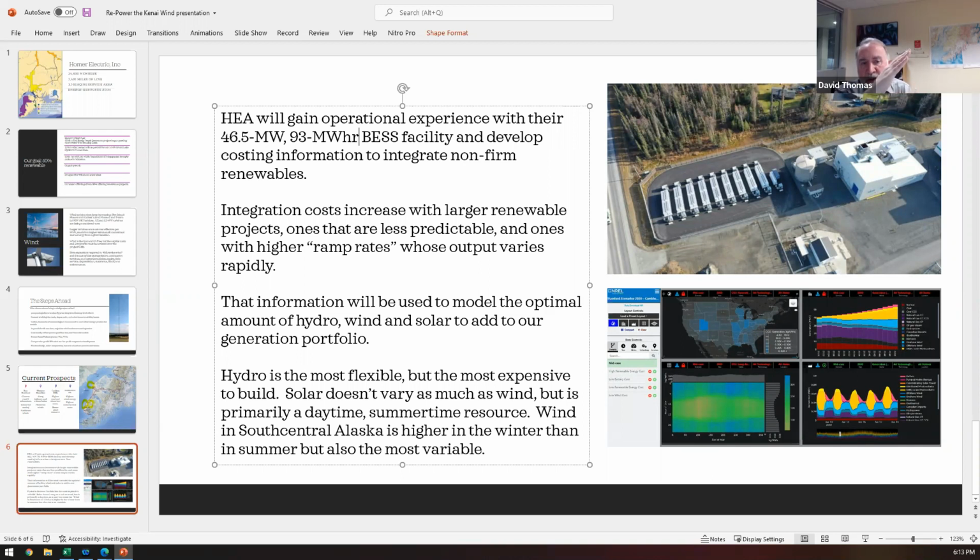It's more expensive to build on a mountainside. So the flatness of the site itself, a sloping ridge or a plateau, is less costly to build on. A ridge is better in a valley because it gets you up into the better winds. Also, the cumulative slope to get there: if you were a lazy hiker, how would you hike to the top of that ridge? You take the gentle slopes to get there, and the road will as well.